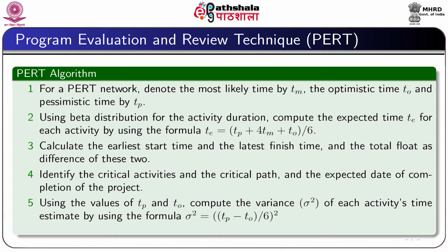We then calculate the earliest start time and the latest finish time and the total float as difference of these two. Then we identify the critical activities and the critical path and the expected date of completion of the project.